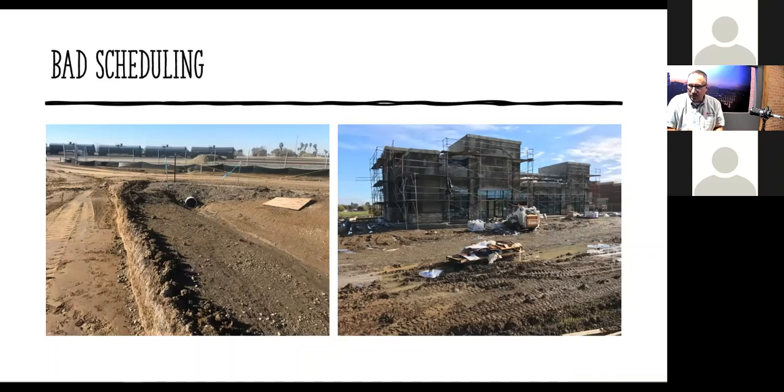The other one is a fast food restaurant that was being built in the valley here, and same deal. They had every opportunity in the world to put in the pavement, the parking lot, the driveways. They had every opportunity to do that before the rains came in. Quite a nice window. They didn't start in October. They started early in the summer. They had all the opportunities, but people want to just do what traditionally is done. And therefore, because paving's not usually done to the end, they waited. Well, they got themselves into the same boat. They were having to over excavate just to maintain access.